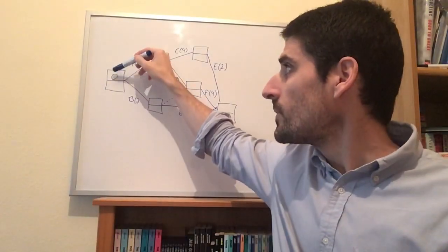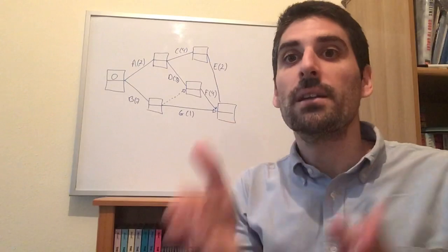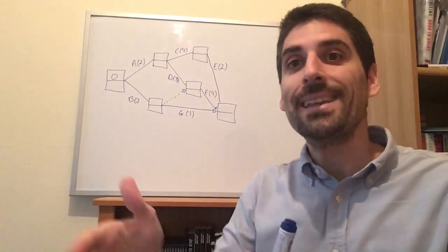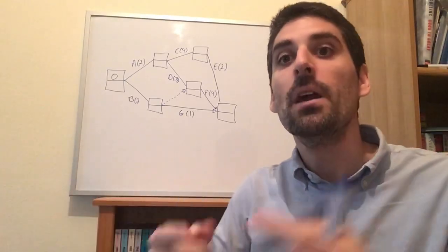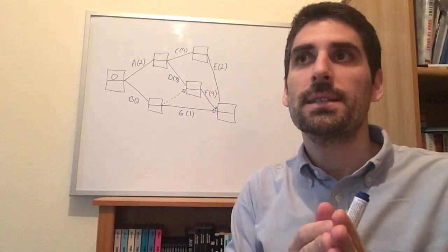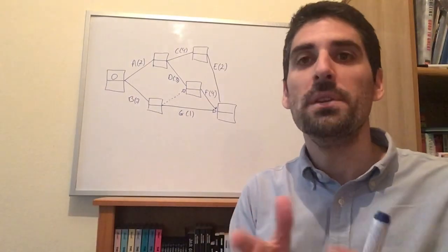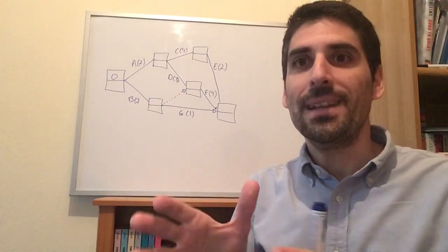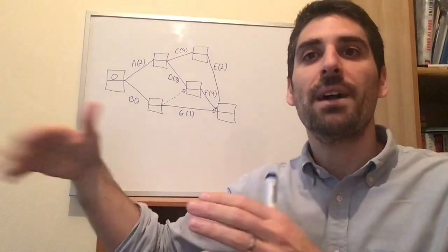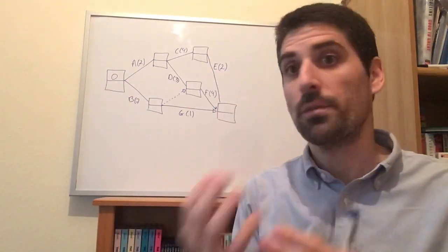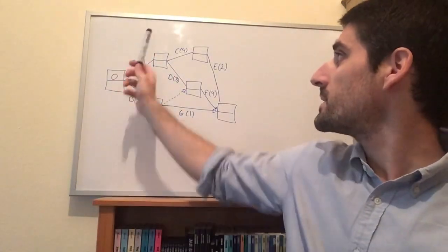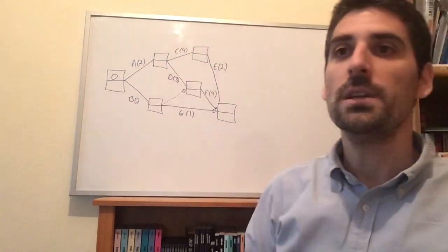So the top box is going to tell me the earliest that I could start an activity, and the bottom box is going to tell me the latest that I could delay starting an activity without affecting the overall length of the project, because some tasks are not critical, which means that we can delay the start of them a certain amount of time, and that won't have an overall effect on the duration of the project. Now, here in this diagram, I've got my activities A, B, C, D, E, F, G,